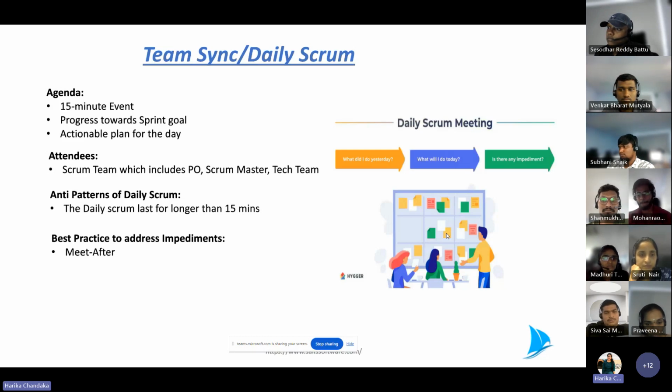So the important topic I would talk about in the daily sync meeting is anti-patterns, which are common things we shouldn't be doing during a daily Scrum call. A daily Scrum call should never last more than 15 minutes. It's an unbreakable rule, because we call it the daily stand-up. I hope most of you know that we call it the daily stand-up.